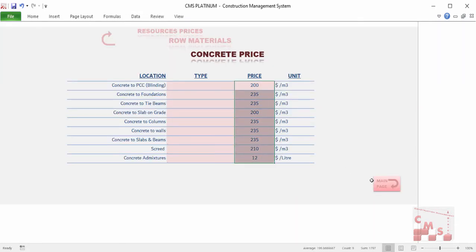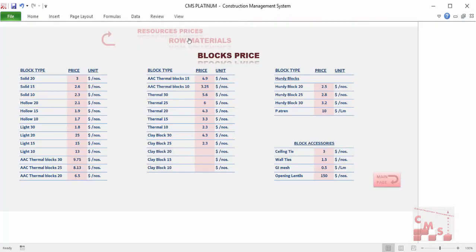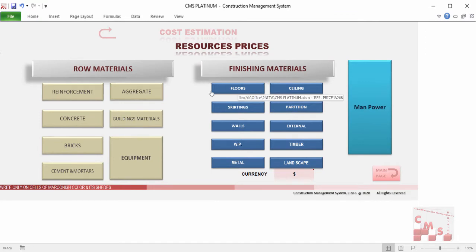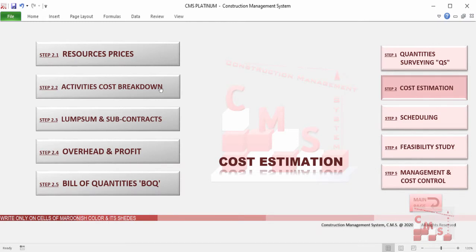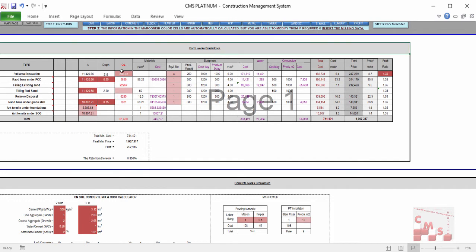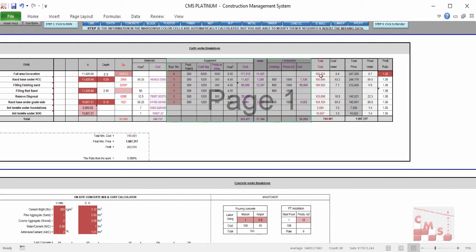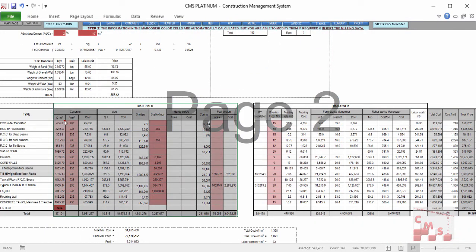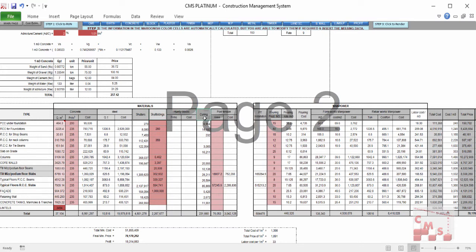For example, you insert only the prices for rebar according to your location, or the concrete according to your supplier, or aggregates, block, cement, and even the prime cost or purchasing price for your finishing material. After inserting this material cost, CMS will make an activity cost breakdown automatically and provide a detailed breakdown for each activity — starting from earthwork, concrete, blockwork, plaster, finishing — adding all required costs for subcontract and lump sum work. For earthwork, CMS gives us all material cost and equipment cost, and at the end the cost for each earthwork activity.